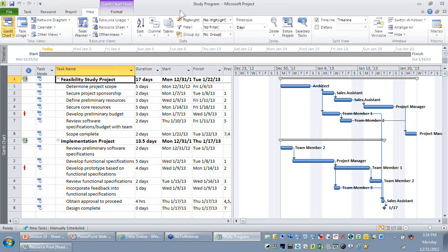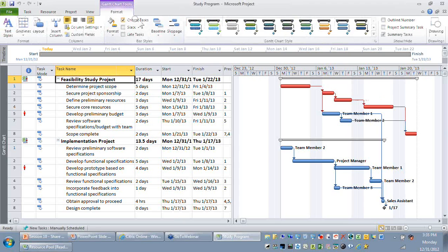Okay. So in this program, if you look at it, it looks as if you have only one critical path. You might say it is wrong, because for this project I have a different critical path, and for the first project I have a totally different critical path. But Microsoft Project tries to look at this as one single project rather than two different projects.